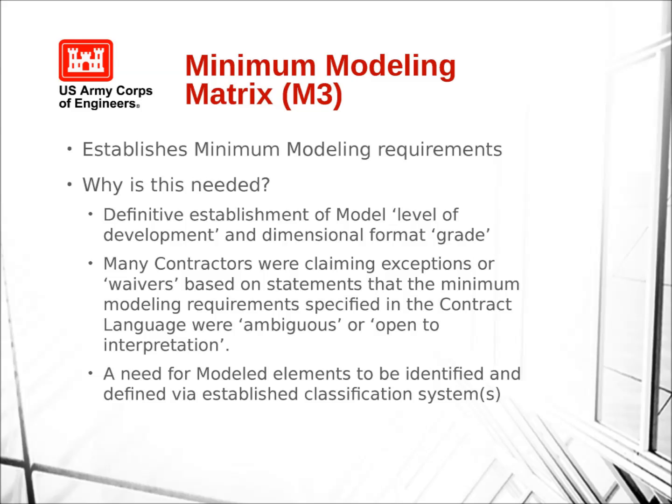So that we would be talking about level of development, and then for each one of the items, each one falling through our classification of all of the elements in a particular project, not only do we want to define the level of development that's required, but we also want to be able to assign a grade for each one of those categories. So are we expecting a grade A, which would be fully 3D, including facility data? A grade of B would be 2D with facility data. Grade of C would be 2D only, parentheses, traditional CAD. Plus there are plus and minus modifiers to those as well.